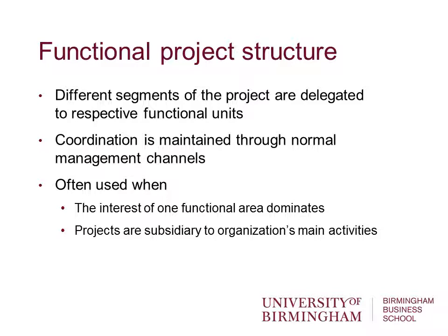Okay, functional project structure is where projects happen within an organisation. It could be an organisational change activity, or developing a new product, or something like that. Okay, we have in these kinds of structures different segments of the project dedicated to different functional units. So different functions within the organisation, a business as usual type of organisation, will then carry out some work dedicated to a particular project. Coordination is maintained normally through existing management channels. It's often used when the interests of one functional area dominates, and where projects are subsidiary to the organisation's main activities. So this will be a lot of organisations out there.